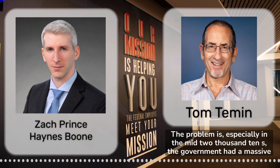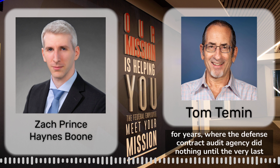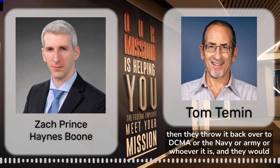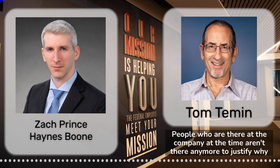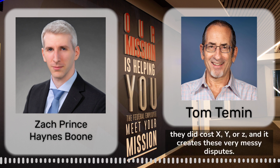The problem is, especially in the mid-2010s, the government had a massive backlog in these types of contracts where they'd have proposals that would sit there for years, where the Defense Contract Audit Agency did nothing until the very last minute when maybe they would disclaim the ability to do an audit for whatever reason, and then they throw it back over to DCMA or the Navy or Army or whoever it is, and they would have to say, okay, what do we do with this now? Usually this is years after a cost has been incurred. The people who are there at the company at the time aren't there anymore to justify why they did cost X, Y, or Z. And it creates these very messy disputes.